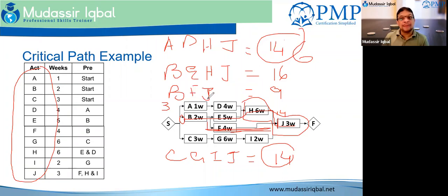I did the job, but then something bad happened, risk happened, which we were not thinking of, which we tried to mitigate, but the results were not as we planned. And you got activity A done in 3 weeks. Suddenly, you have a new critical path on your project, which means now activity D cannot be delayed at all. So this is how you look into the paths of your project.